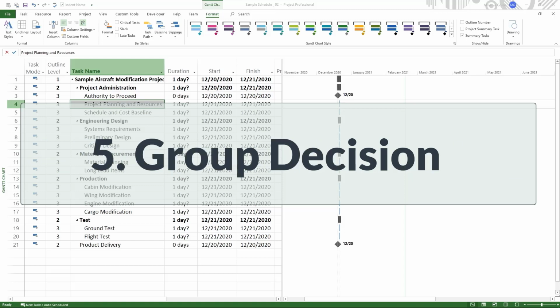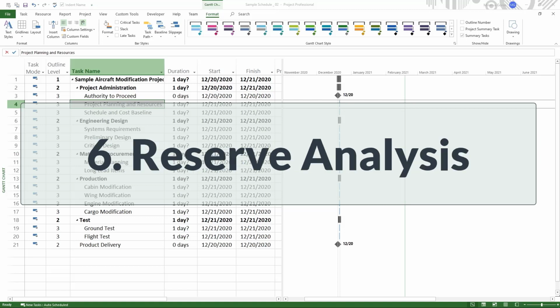We also have the technique of group decision making. Here we can have consensus decision making, weighted vote, or the Delphi method. The consensus decision making is where the majority of the group agree on a decision. The Delphi method is when each member takes an estimate without knowing what the others chose. Then these can be charted out and see where the decision converges.